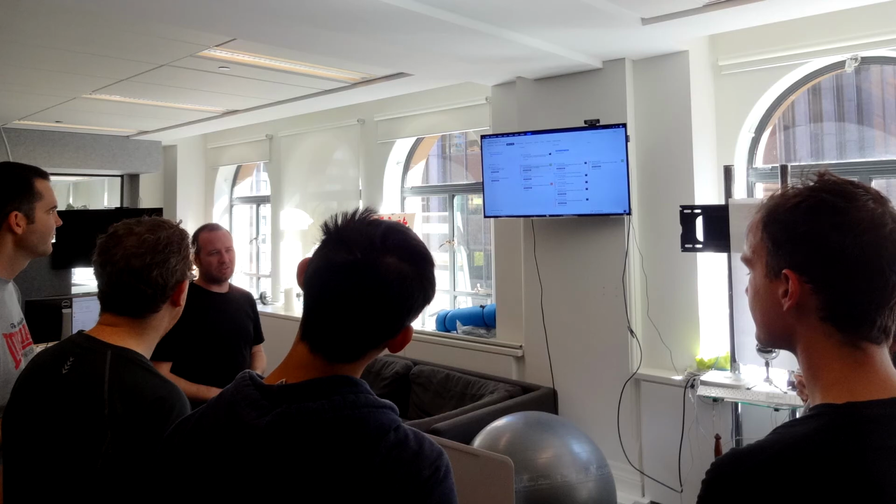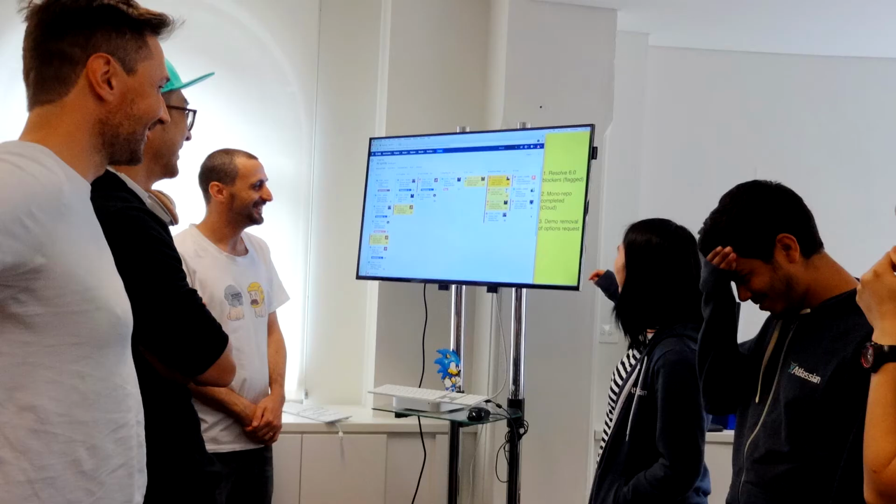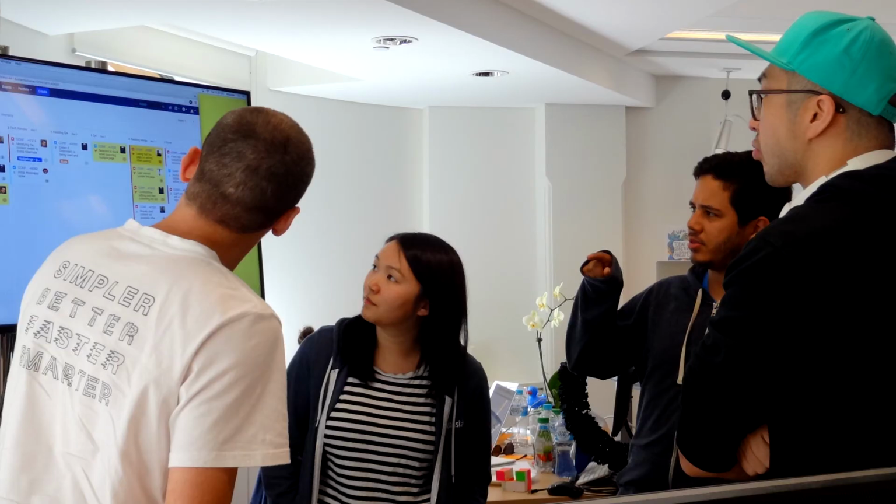Here, it's in fact the Confluence team standing around their stand-up board. So that's a big difference. That's a sign that you're doing a task-centric stand-up, if you're using a stand-up board to walk through the columns on that board and talk about where the work is at. It also makes it less obvious if tasks are not in the correct status, and it'll encourage the team to ensure that they get them updated if they're not already.